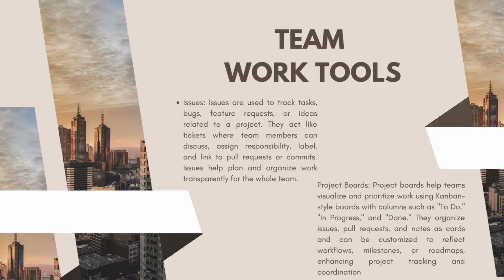Project boards. Project boards help teams visualize and prioritize work using Kanban-style boards with columns such as to do, in progress, and done. They organize issues, pull requests, and notes as cards and can be customized to reflect workflow, milestones, or roadmaps, enhancing project tracking and coordination.